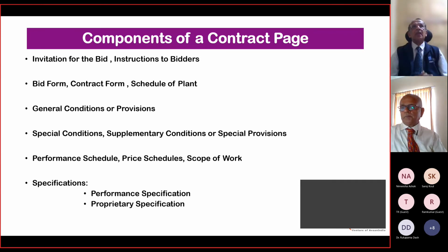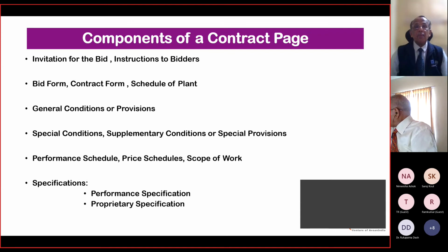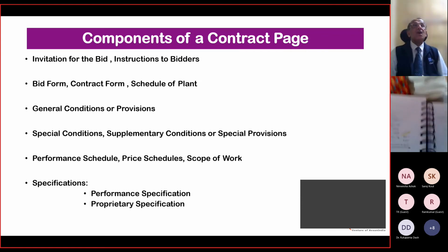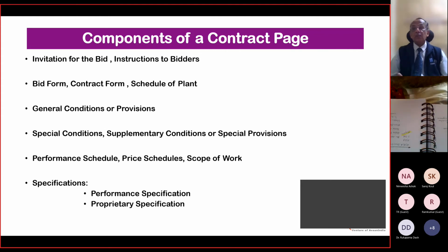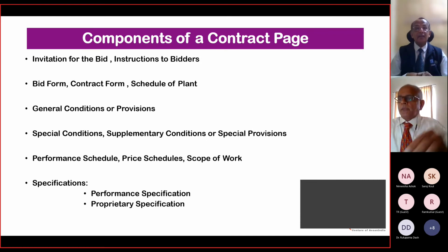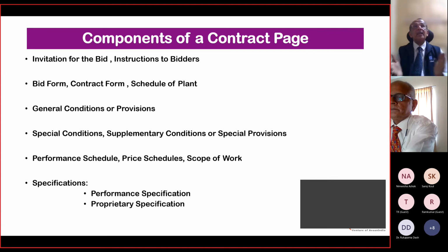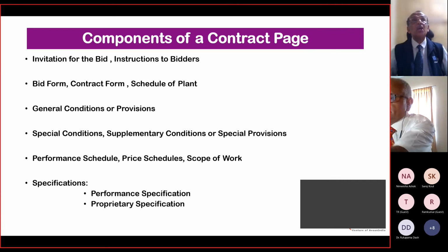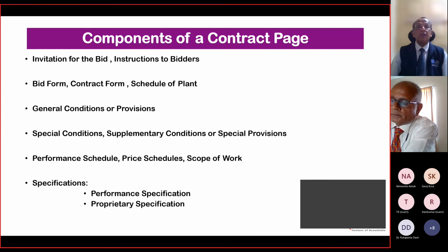So it's essential that when you incorporate proprietary specifications, you have to be very precise. You should say the technology applicable at the point of time when it is going to be delivered. Essentially, you have to mention that very clearly. And if there is any additional cost, it can be mutually agreed upon. Any questions on this one?